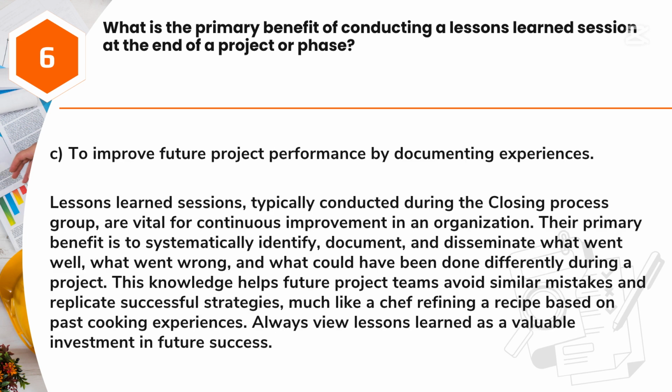Answer: C. To improve future project performance by documenting experiences. Lessons learned sessions, typically conducted during the closing process group, are vital for continuous improvement in an organization. Their primary benefit is to systematically identify, document, and disseminate what went well, what went wrong, and what could have been done differently during a project. This knowledge helps future project teams avoid similar mistakes and replicate successful strategies, much like a chef refining a recipe based on past cooking experiences. Always view lessons learned as a valuable investment in future success.